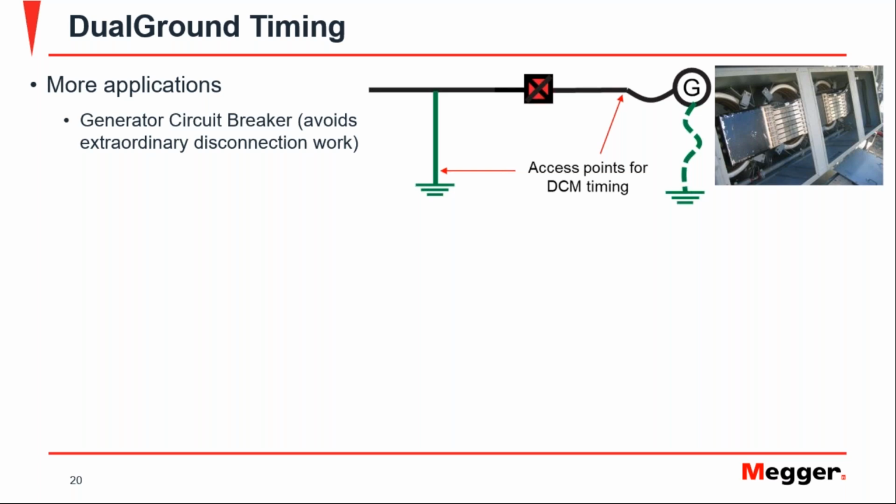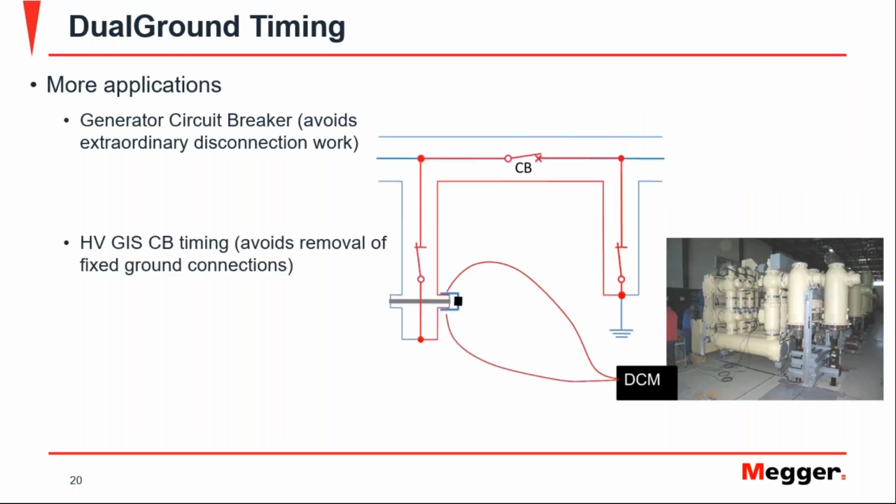So to be able to test, probably a 3-hour test, you're going to spend one day prior to that and one day after the testing disconnecting and connecting back the generator. So not very fun to do.